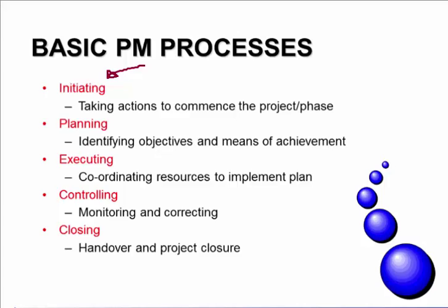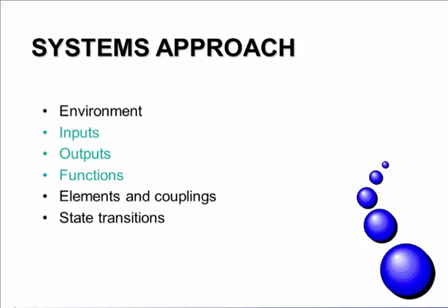And those steps, including the closure steps, define the scope of the project. And it's very important to define the scope in terms of a series of steps which have both a start and an end.